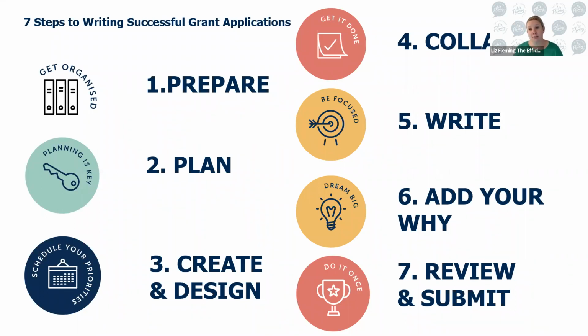The supporting documents, some people forget about that. They go, oh, I can write it all. The big thing to remember there is you can't create them yourself. You need to get quotes from external suppliers, and the letters of support. Obviously, you need them to sign it as well. So my client who rang 24 hours before a grant was due, that required letters of support, external quotes. And I just said, look, there's no way you're going to get that done.